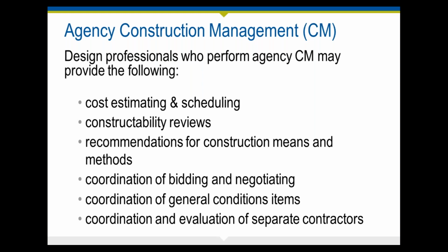You'd be involved in identifying long lead items for pre-purchase. You'll be involved in scheduling, sequencing, and coordination of bidding and negotiation with the various contractors, coordinating the general condition items, and coordinating separate contractors.